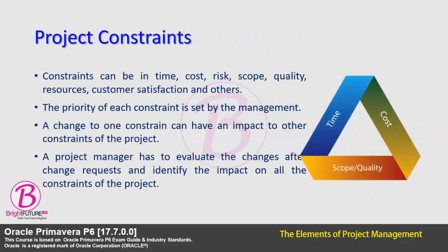Constraints. Constraints can be in the area of time, cost, risk, scope, quality, resources, customer satisfaction, and others. They can help evaluate competing demands. The priority of each constraint is set by the management. A change to one constraint can have an impact on other constraints of the project.